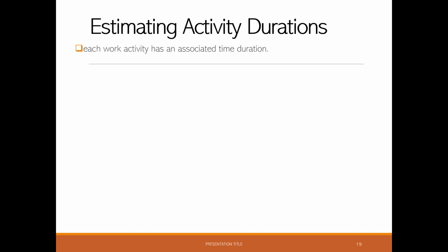For instance, if there are four activities in a project, and the total duration of these activities is 3 days, and another activity proceeds in parallel with this sequence, the 3-day minimum duration of these 4 activities is unaffected. Now, more than 3 days would be required for the sequence if there was a delay or a lag between the completion of one activity and the start of another activity.